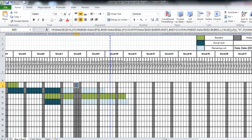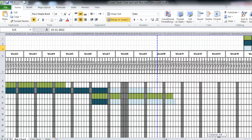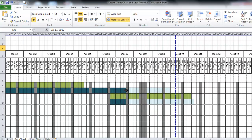Everything you need to identify — your data date — is very important. Our data date here is 15 November. Before 15 November will be actual work, and after 15 November will be the remaining work.